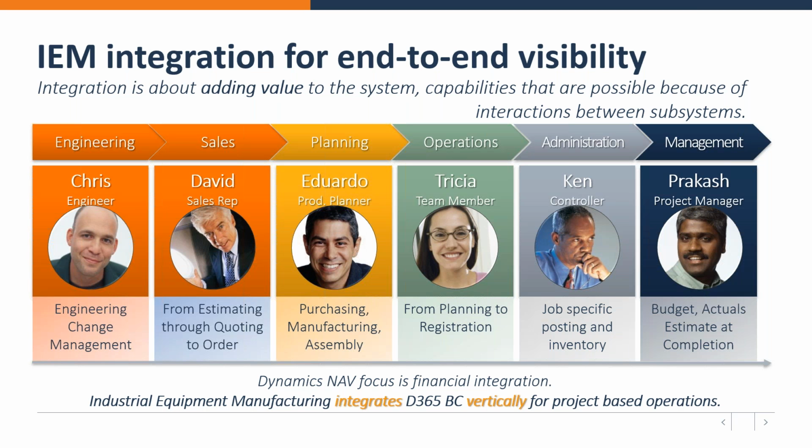Sales has a very important step here in identifying the requirements. So they need to understand what the deliverables are within acceptable criteria, right? What's within the scope, what are constraints for executing the project, and what are the assumptions leading to possible risks. This all happens within a single system. So they create the estimate, the quote, and the job executable order.